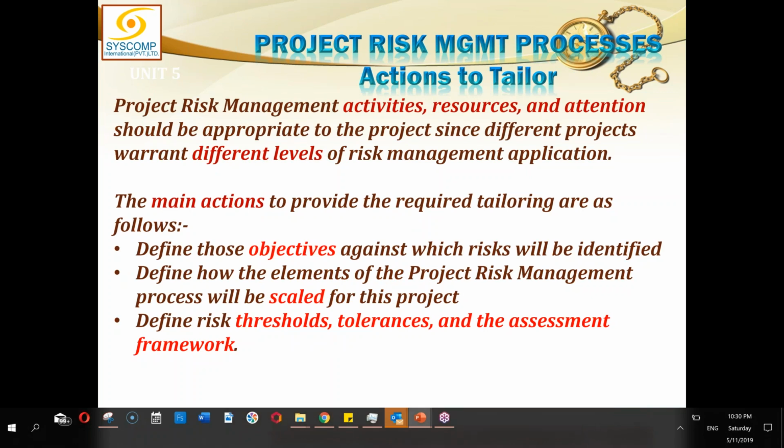We are more sensitive about, say, time, and we don't care much about money. So probably the risks related to cost will not be catered much, whereas we are having a very low threshold for risks in the area of schedule. Therefore, all our attention would be focused on that. So this is not only the matter of just the three or four objectives, but which of those objectives have to be focused on.